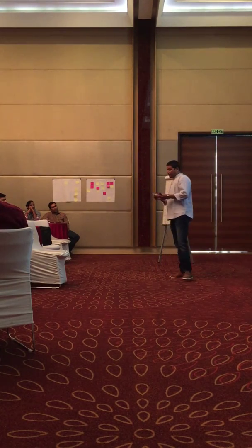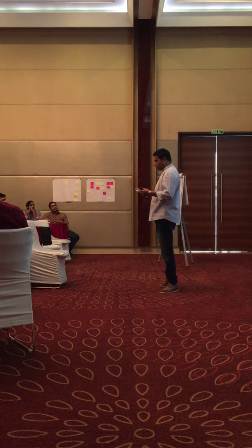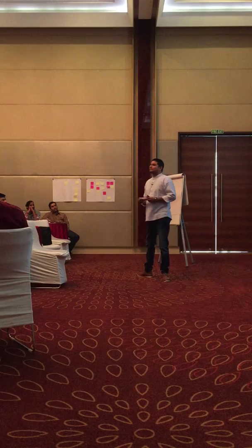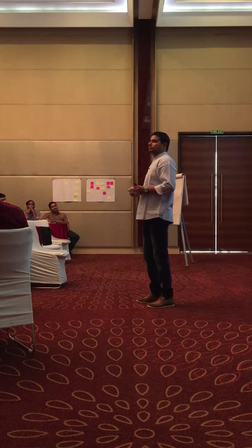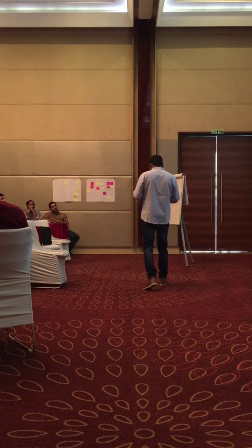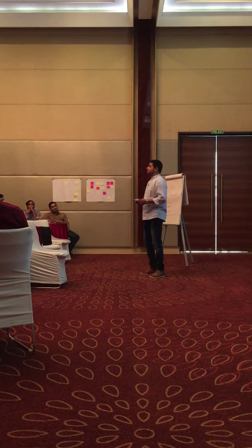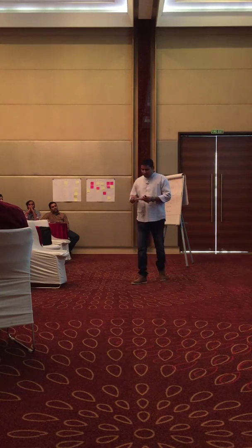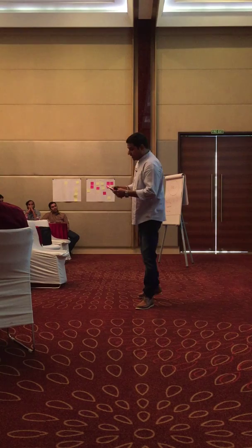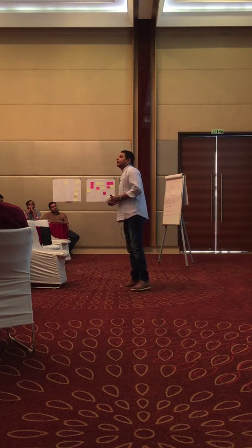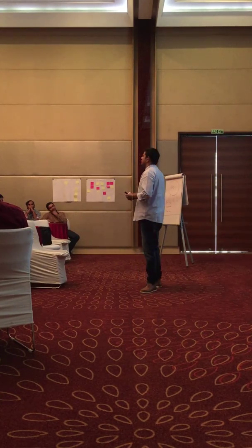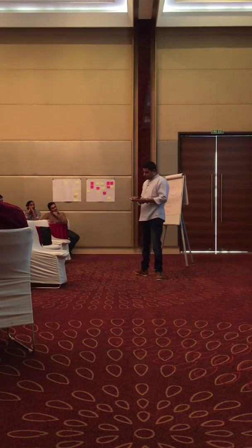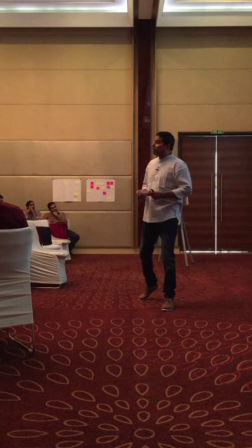Very good. The product backlog is sorted from small items at the top always to large items at the bottom. False. Good. Anyone can create backlog items, but the product owner has overall responsibility to manage the items. Very good. The development team may work on critical engineering items without placing them in the product backlog. False. Anything and everything that the development team is working on for the product should be in the product backlog. That is the single living artifact. One of the most important artifacts of Scrum development is the product backlog. Next one, the development team is responsible for estimating the backlog items.